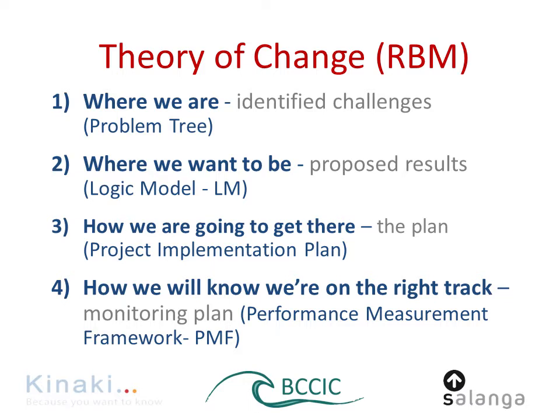That's the logic model. That's when we take the problem tree and try to flip it into sort of positive, finished statements. The third stage is how we are going to get there, measuring the journey, being able to define how we are going to get there, and that's the project implementation plan. And now that comes together very closely with stage 4, and that's how we will know we are on the right track.